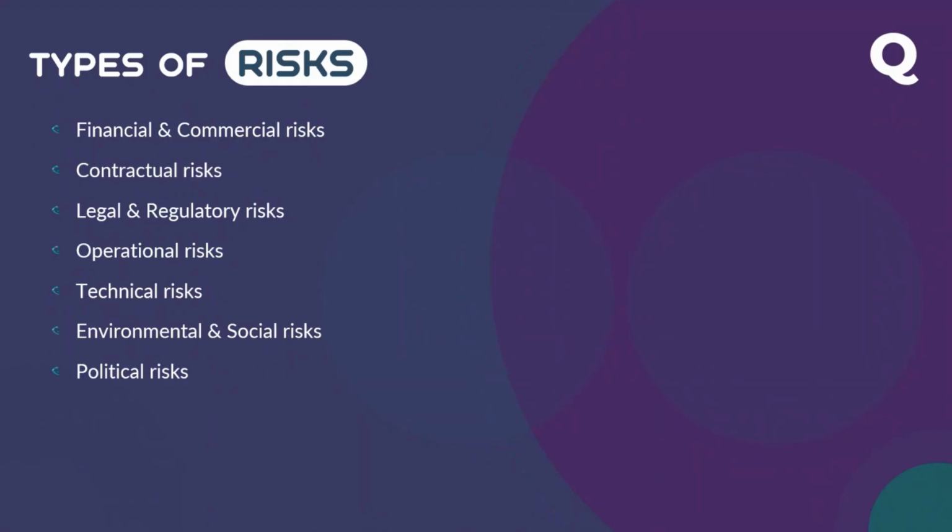Third party risks are very important because that is somewhere hidden in the contract. You cannot find it when you see the words; you will not be able to see those phrases or wording. But eventually, there is a third party. So you should ask, dear client or consultant, how you can be indemnified from this third party, and when you nominate someone, how his contract will indemnify you from his damages.